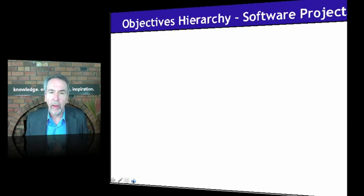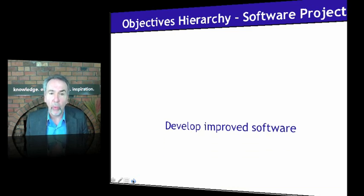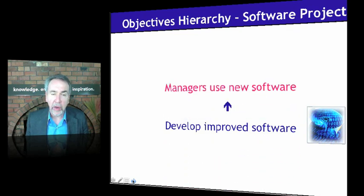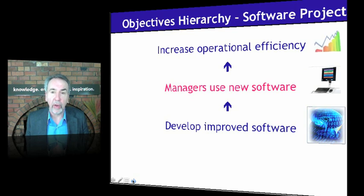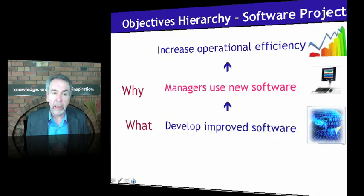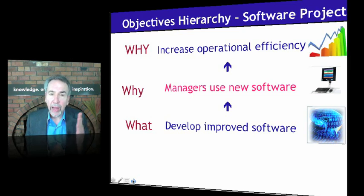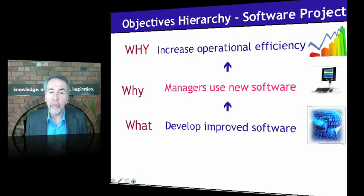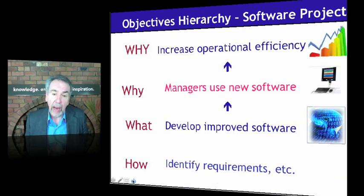Here's another example from an organizational setting concerning software development. The logic might be: if we develop improved software, then managers will use the software. If managers use the software, then we can increase operational efficiency. It's a what, a why, and a big-picture why. The importance of this is that by aligning objectives, we can define what success looks like at each level. If we do that before going on to action steps, we'll be in much better shape. After we have this hierarchy in place, we can identify the action steps — and that's the how.